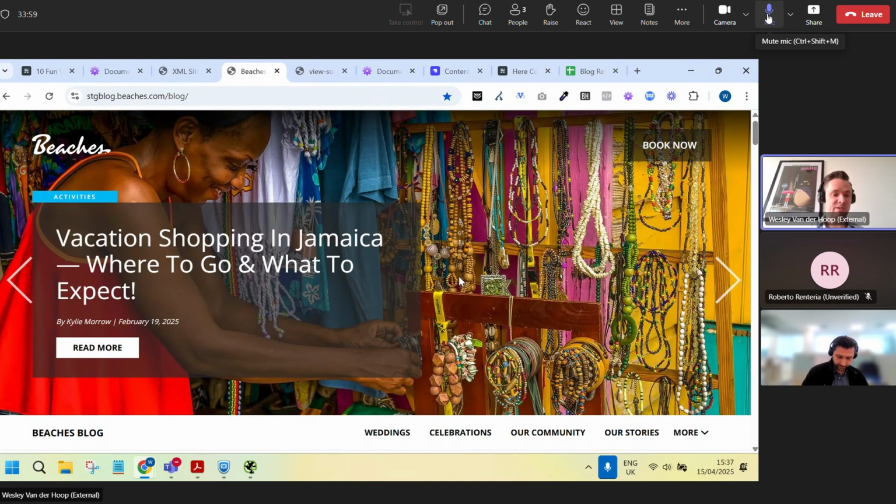But that means the sheet needs to be ready in tip-top shape. You have to figure out how much time it costs, etc. Yeah, you have done your 5 test blocks. You have measured the time. You have a timeline in mind, etc. So there's still quite a bit of work to be done before we get there. But then hopefully after that we can pump it out in 2 weeks, if not 3 weeks.